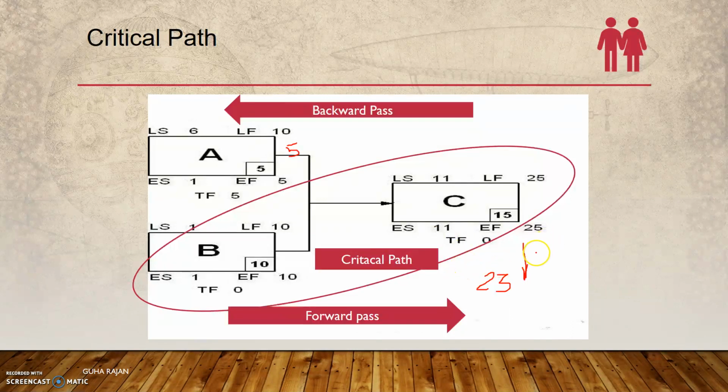So whenever we set the finish date constraint, the customer or any stakeholder may say that no, the project needs to be completed on the 20th day instead of 25 days. You'll see Primavera calculates the negative floats. So in the next presentation, we will see how this is done in Primavera.